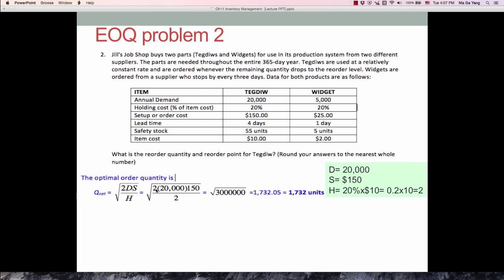The square root is 2 times 20,000 times 150 divided by 2, because holding cost is 20% times $10. So 0.2 times $10 is 2. Then we can have 1732.05. When you round down, this is 1,732 units. That is your EOQ.